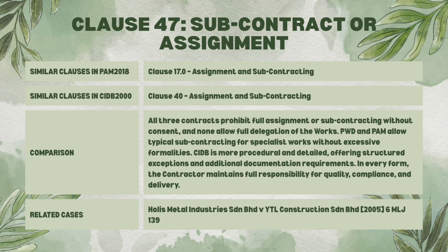The decision is, the court held that there was no privity of contract between Holis Metal and the employer. Holis Metal could not enforce payment or make any legal claims against the employer directly, since there was no collateral contract or special agreement between Holis and the employer. Holis had no legal rights to sue the employer.